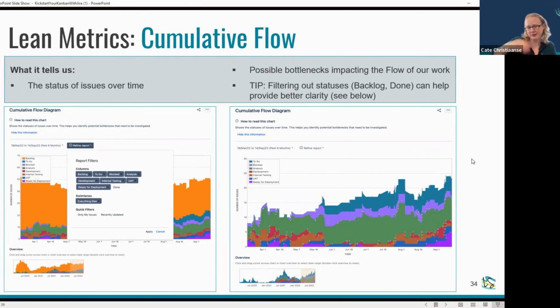And the other thing I would add is where you see those step changes, that's showing you either a big addition in one area or a big drop in one area, which means you probably don't have a good flow. It's a big batch just entered or a big batch just exited, and we're going to want to look into why that is. Exactly. And what Cate just said, again, that's going to be the same rinse and repeat sort of muscle memory type thing.